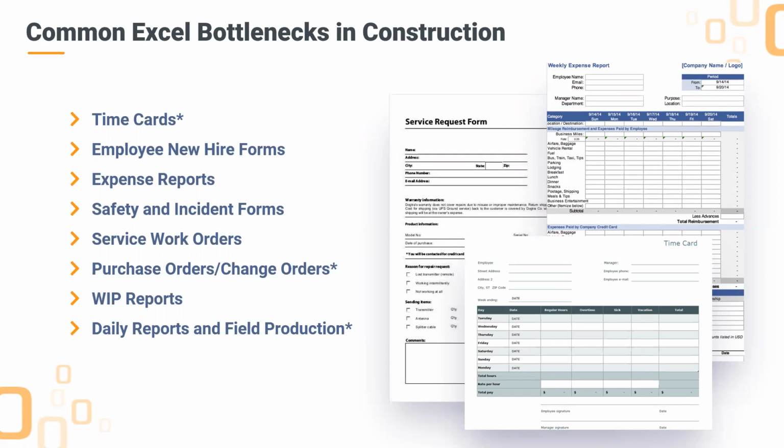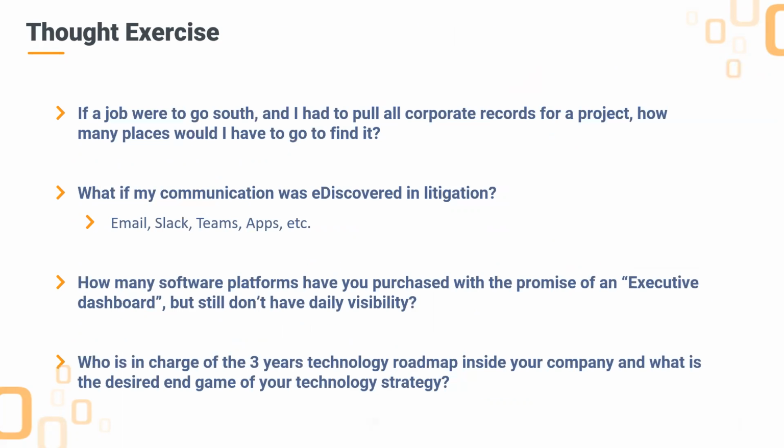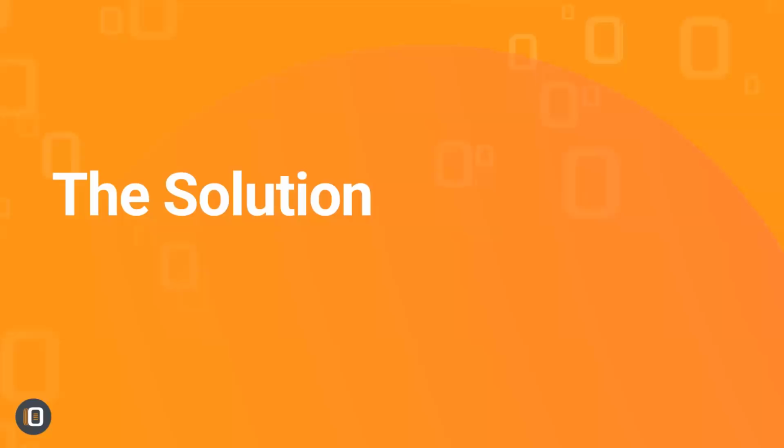What feeds a progress report or a WIP report? Well, most companies have a daily report that gives us equipment usage, labor on site, anything that's been going on, safety issues, whatever, and what we've produced. How many linear feet of that cable did we lay? So we can feed our WIP report and ultimately use that for many, many things, draw requests, billing, whatever it might be. So we're going to go through a few of those.